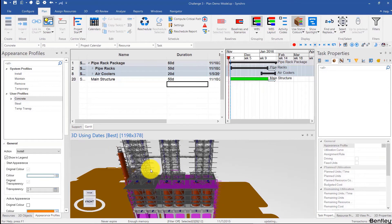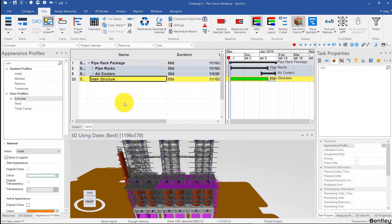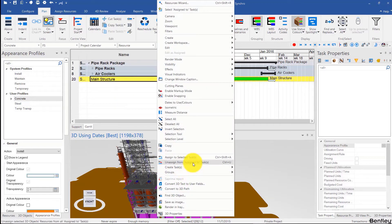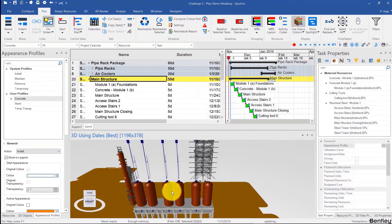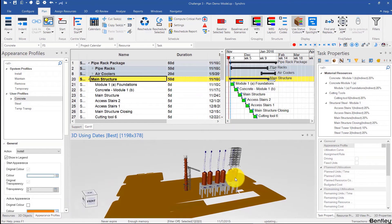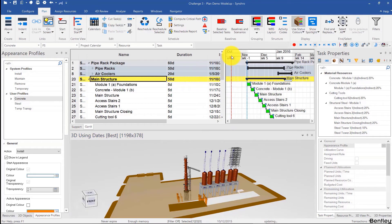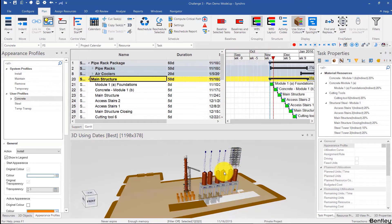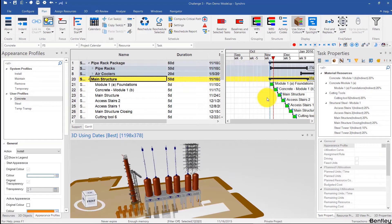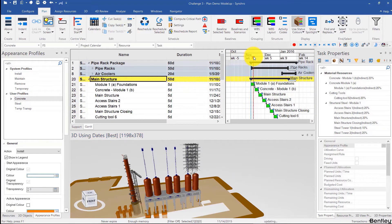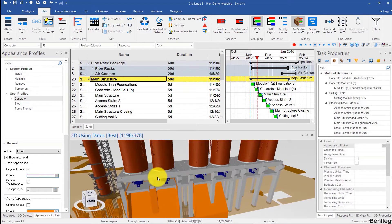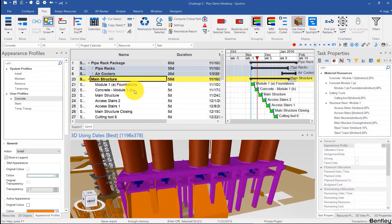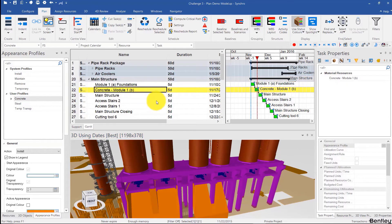You only need one element from each resource, and then select this, right-click, create tasks under selected task, and let's see what we have. We have the foundations — we forgot this steel structure, that's okay, we'll add that. So we have the foundations and then this structure. This structure over here should be the same task as this one, so I'll just add that using Ctrl+Shift+A.